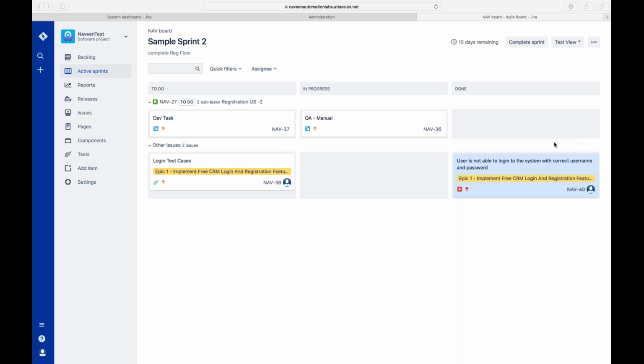Let's say the logo is missing on your web application. Facebook logo is missing. It's impacting the Facebook brand, right? Although it's a very low severity issue, because you can fix it within 2 minutes. So this is an example of low severity but very high priority, meaning you have to fix it. Without that, the release cannot happen on production, or without that, we cannot deliver the feature.